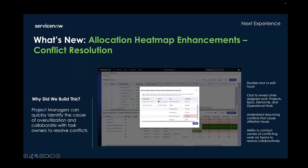One example is that the allocation heat map has been enhanced for better conflict resolution. Now when you click into a week, you can see what other work that resource is assigned to do, whether it's a project, epic, demand, or operational work. You can see the owners of other tasks so that you can reach out to them to resolve conflicts. And if the Teams integration is enabled, you can click on that task owner's name and directly reach out to them to resolve the issue.